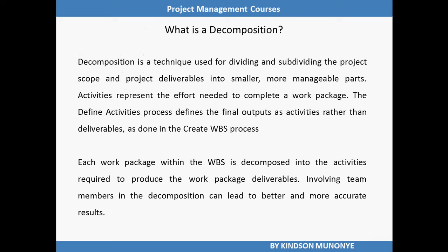Activities represent the effort needed to complete a work package. Remember, a work package is the smallest or the lowest level in the WBS. Remember, create WBS is a process under the project scope management knowledge area. And the output of the create WBS process, of course, is a project scope baseline. Let's not digress too much. Let's just continue on decomposition.